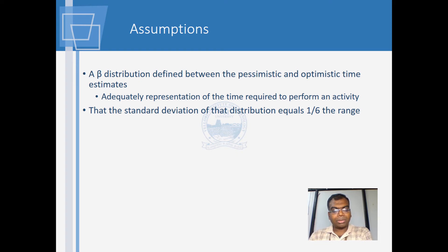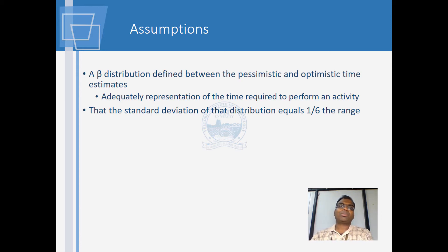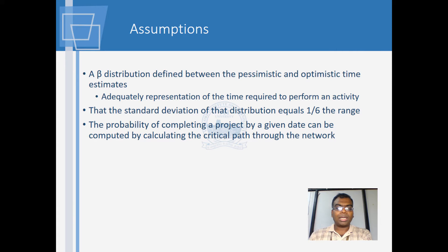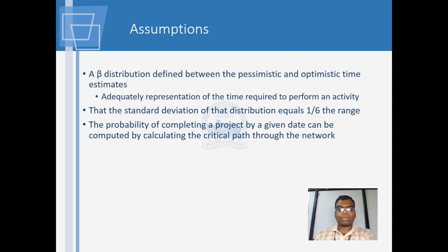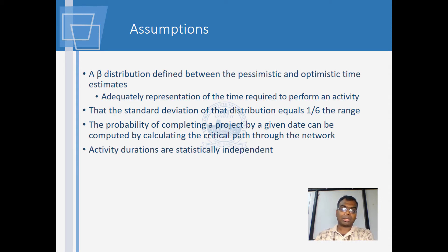The distribution equals one-sixth of the range — it is a weighted average. Four times the weight is given to the most likely time, and a weight of one is given to each of the extremities. The probability of completing a project uses the same forward pass and backward pass as the critical path method, the only difference being that dates are probabilistic here rather than deterministic as in CPM.